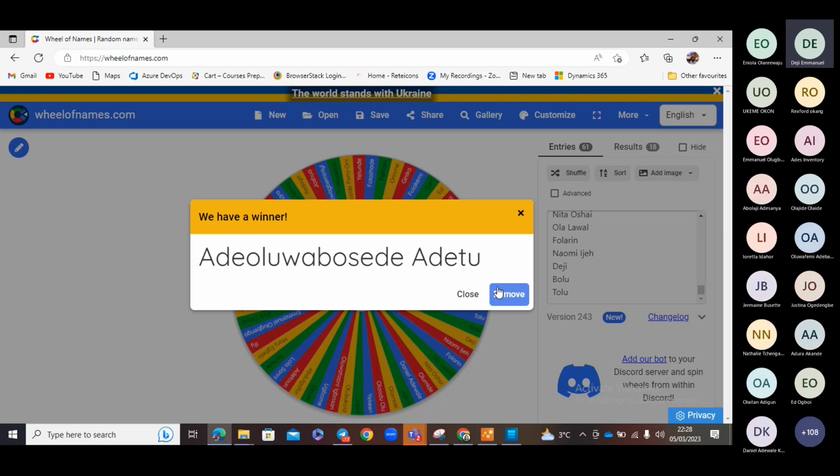The only feedback I want to add is that the solution you prefer is good, but bear in mind that this person's problem is time, because he's working on two projects. Asking to look into how we do estimation so that five stories become three might not solve the problem. The one thing that could solve the issue is capacity planning. Do you get it now?